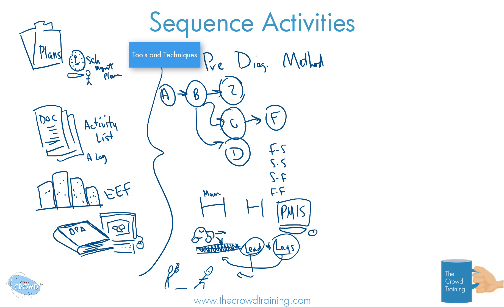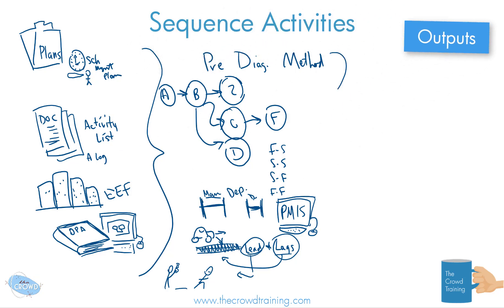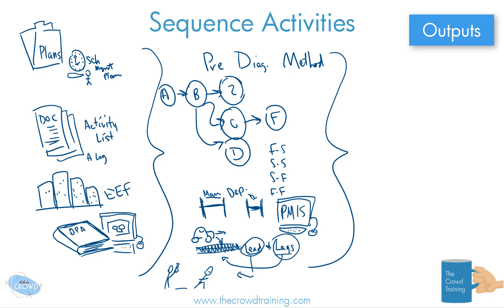You also have various project management information systems — essentially the tools and software you use to help perform the work and manage activities. To recap the tools and techniques: the key ones are the precedence diagramming method, dependency determinations such as mandatory and discretionary, leads and lags, and project management information systems.